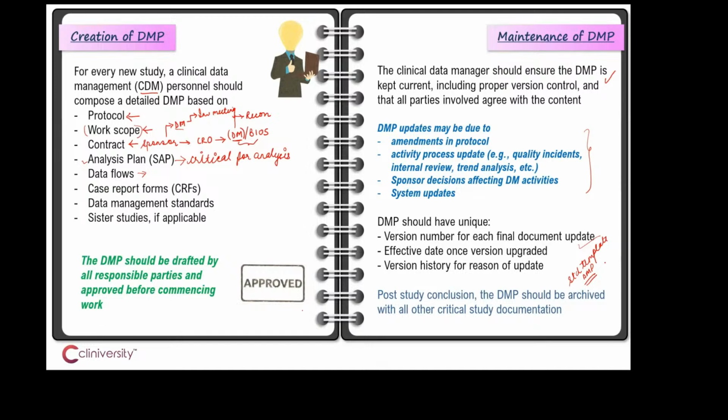So whether they should adopt the new DMP template and move into it, or will they be putting a note within the revision history itself that they would not want to move to the new template because they have already adopted those changes in the current version itself. So it highly depends on the organization. So data managers who are in DMP creation and DMP upgrades have to consider all of these pointers. What if my template updates, or what if new changes are adopted? So how do I move to each of these?